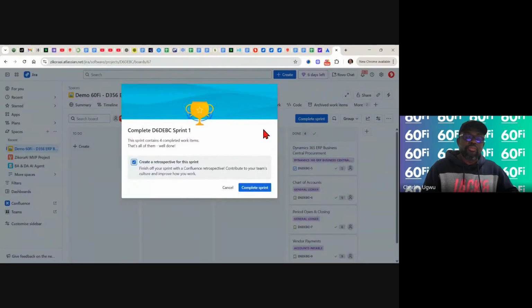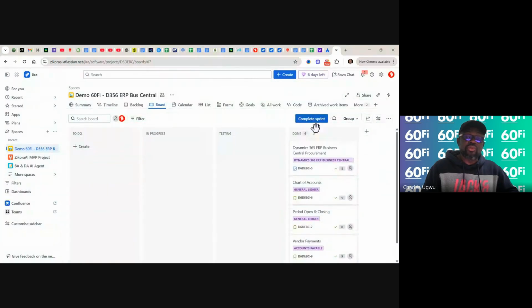It's at this point, before we complete, that we need to go for what we call a sprint demo, and demo before the stakeholders, and then we'll test. That's when we'll test officially. After testing, if any work didn't go well during the testing, then it becomes a bug, and we'll move it back to backlog.